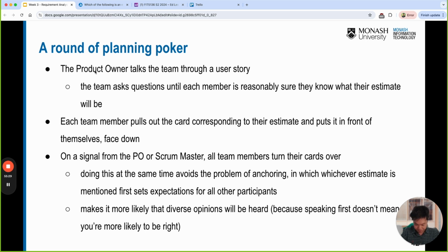Okay. Is it often better to overestimate how many days are needed to complete the task? I would say yes, overestimate is still better than underestimate. But if we overestimate everything, we need to be careful about going over budget as well. Let's say the homepage: instead of one story point, we estimate 5. If we overestimate every task, every user story, that kind of thing, it might lead to something over budget from the customer point of view as well.